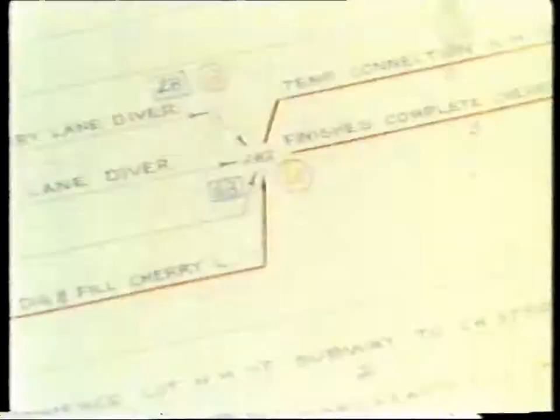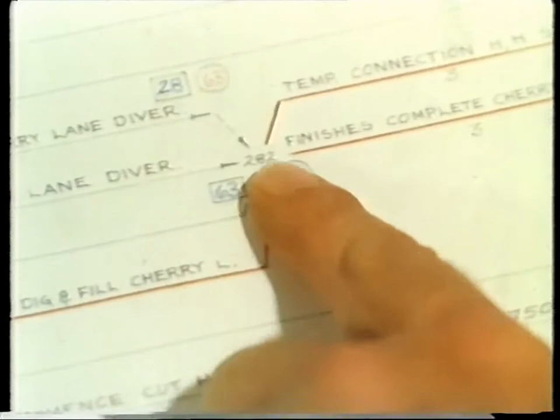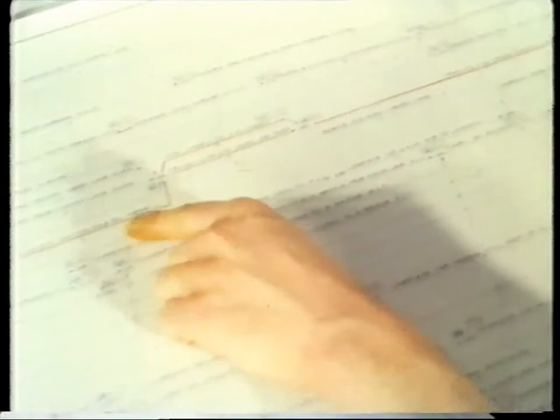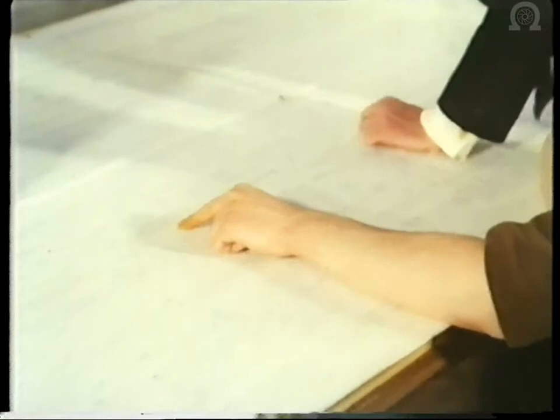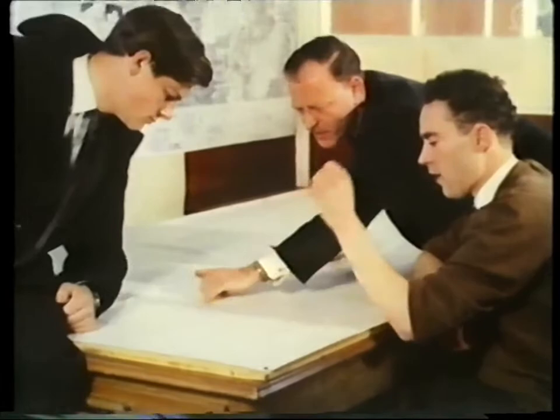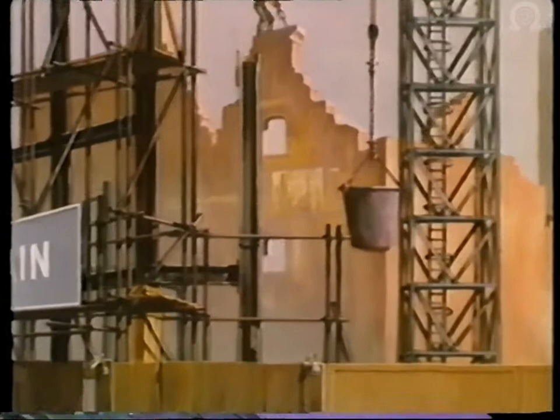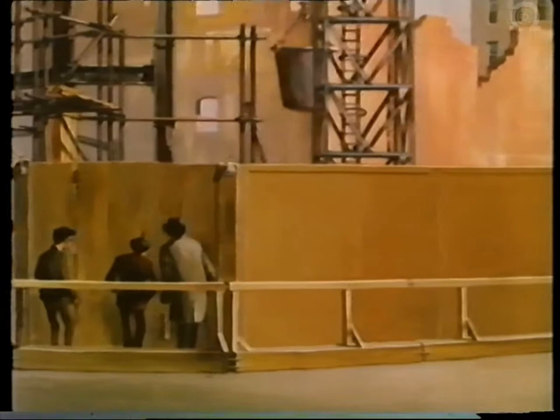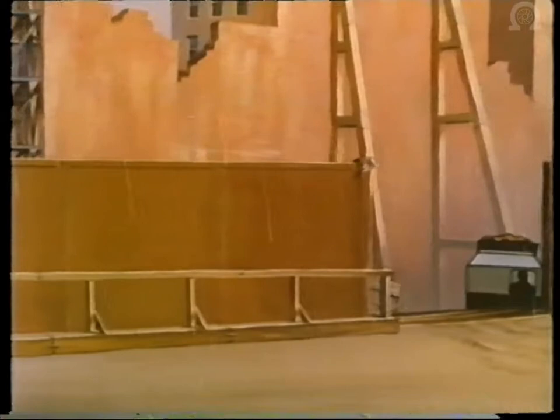This, for example, is part of a diagram for a motorway. Critical path has the particular advantage that it is a visual presentation and focuses the attention of management on the most important jobs in the project. In the construction industry, this technique is particularly valuable, as rapid and well-judged changes of plan have to be made when unforeseen problems arise. Problems can arise from delays in the delivery of materials or a host of other things, including the weather.